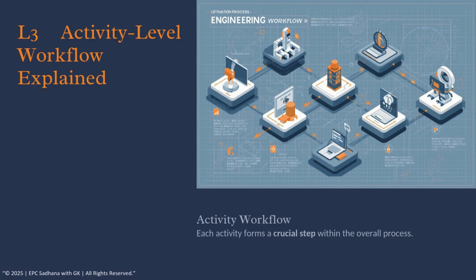So let us understand what is an L3 process. This is where procedures sit, as sub-processes of L2. Why? Because a sub-process is usually a detailed sequence of actions, which is exactly the definition of a procedure. Some examples could be technical evaluation, commercial evaluation, negotiation, PO preparation, expediting. Each of these can have a procedure detailing the sequence of actions. So a procedure is an L3 document.